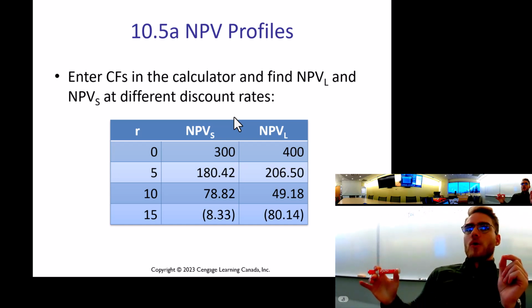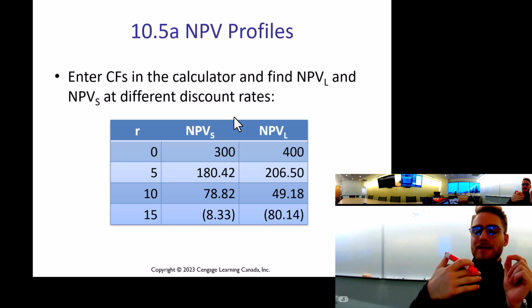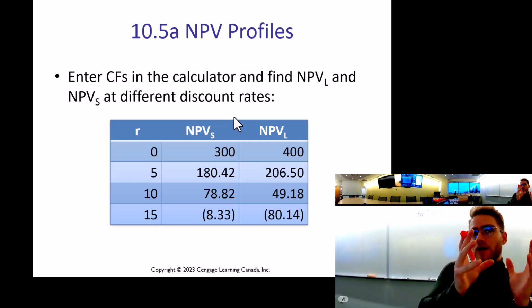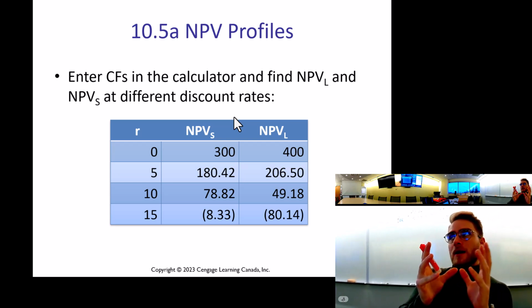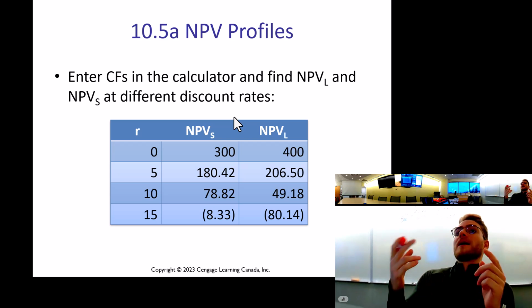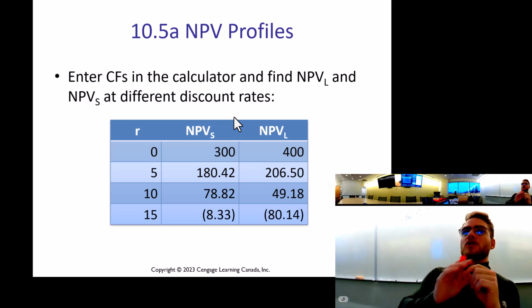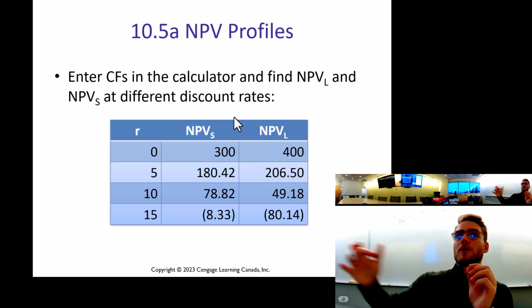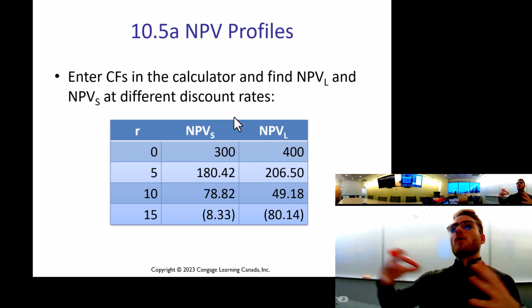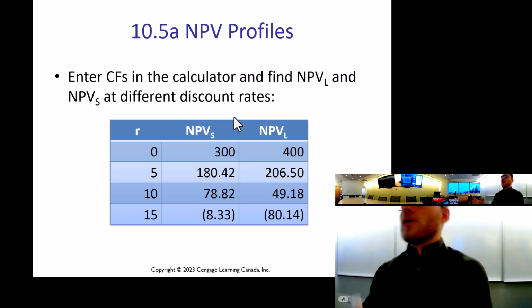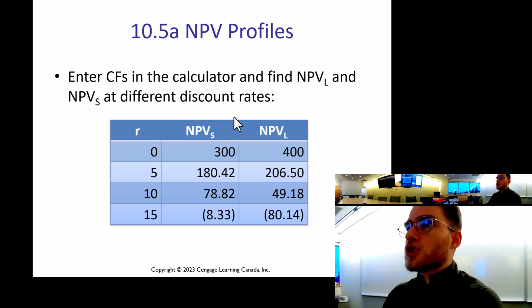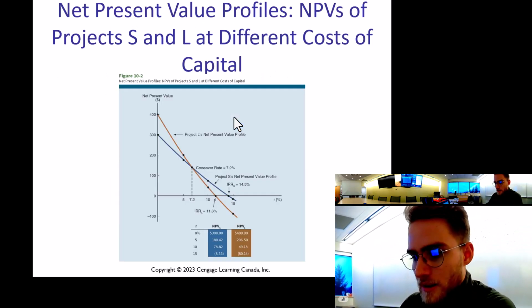So at high discount rates, you'll favor projects that have decent initial cash flows, right? But at low discount rates, you're going to pick projects with really good long-term cash flows, that just have overall greater cash flows as opposed to immediate return. And I'll show you exactly how this works.